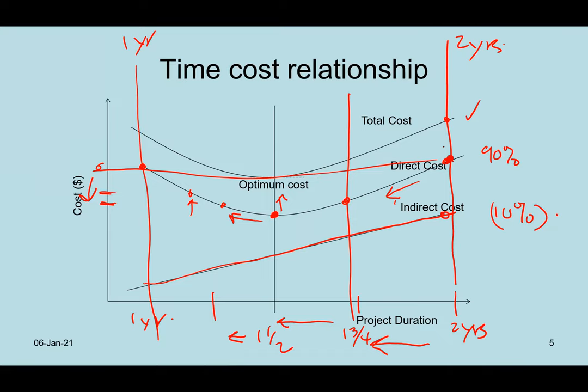As in the case of the video that I showed you. What happens if, for instance, the normal duration of the project is 2 years, but then we just compress it into 15 days, like the project in China, perhaps even 40 days? What could be the new cost? Is it going to be increased or is it going to be reduced? For sure, the indirect cost is going to be reduced from 2 years to 15 days only. You can imagine how much saving that you can do. But how about the direct cost? That could be the question mark.